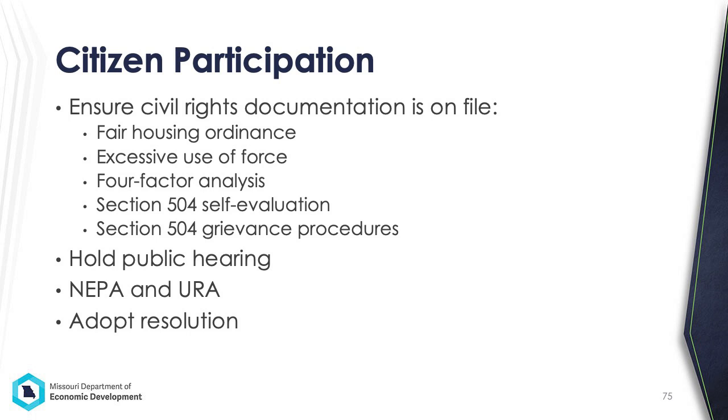Our development team will discuss specific public hearing requirements later today, but I want to stress that the project is subject to NEPA and Uniform Relocation Act requirements once the public hearing occurs. We'll discuss those NEPA and URA requirements in detail tomorrow. Once the public hearing and community needs assessment is complete, the applicant will adopt a resolution to apply for CDBG funds. A sample is available on our website.